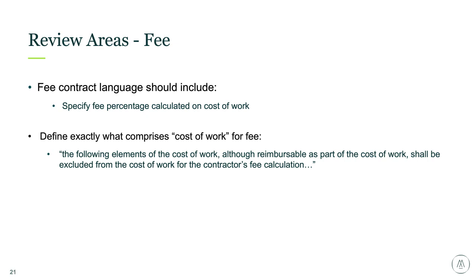And just another note for you guys, we often see insurance, bonds, and other types of markups excluded from the fee calculation.